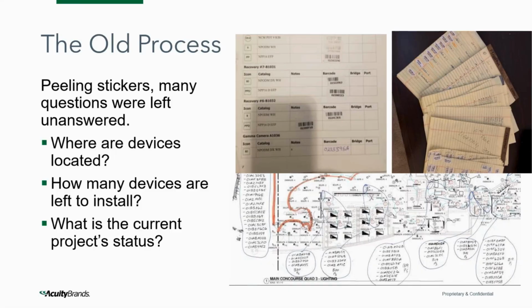Also, as the installer goes through the process, they often claim to be done with the installation, but there's really no fact checking of how far along they really are. That can cause some pain points for you, perhaps as the project manager, communicating between both that contractor and Mar Vista, a lot of the times the agencies that help create that startup date. When you're being told something's almost done and you want a solid 100% it's going to be done by this date when startup is happening, that probably isn't the case; they're maybe half done, so to speak.